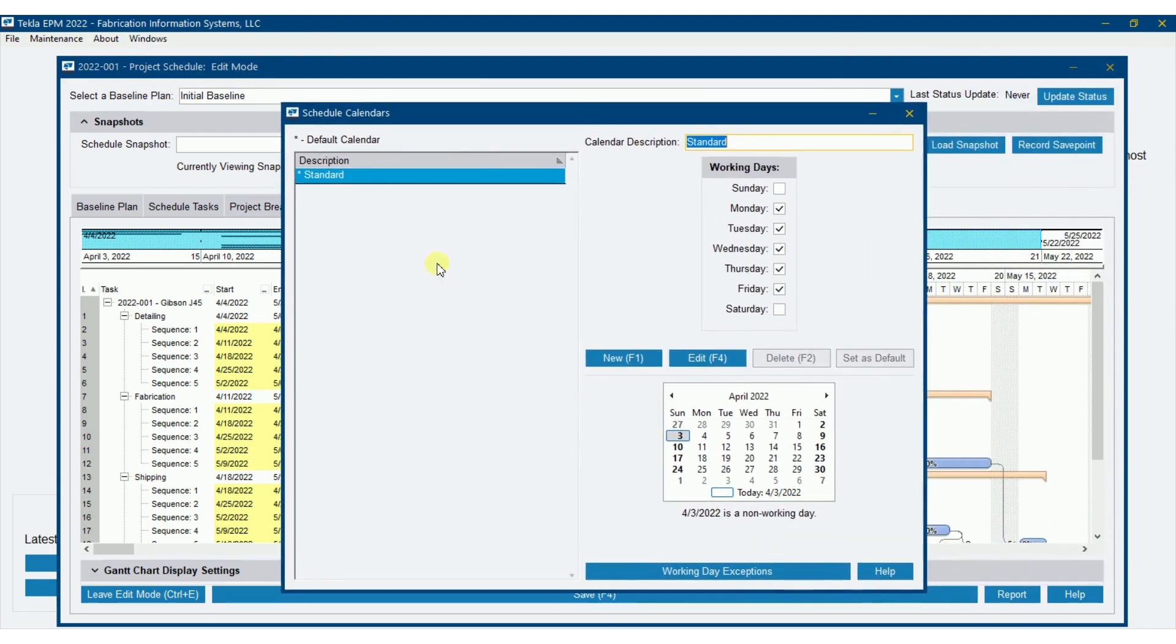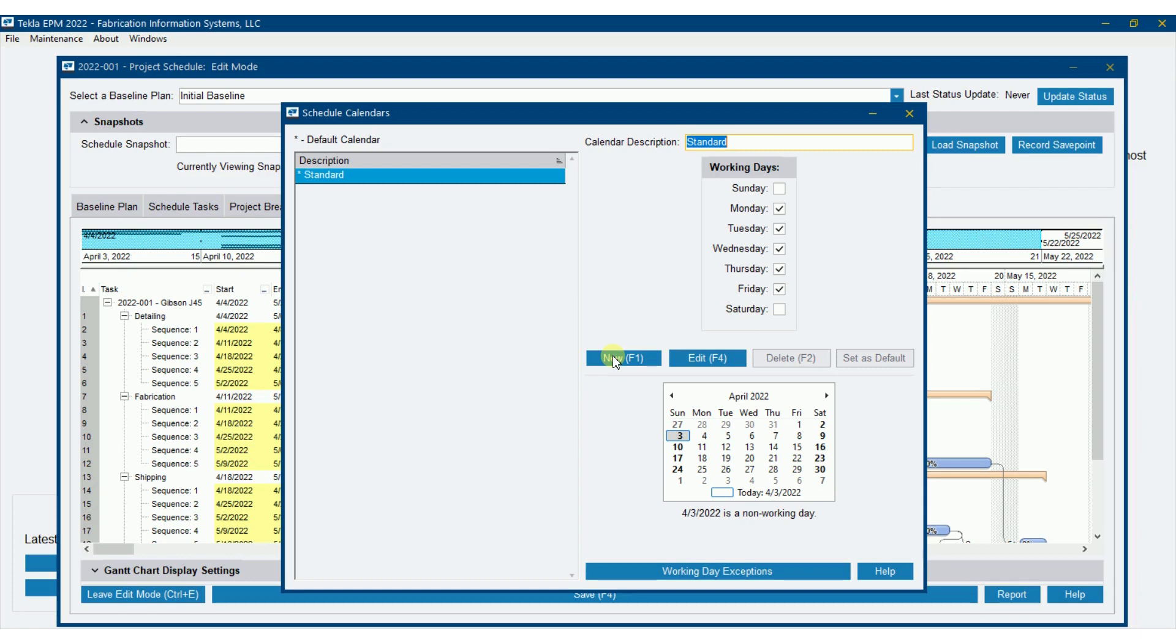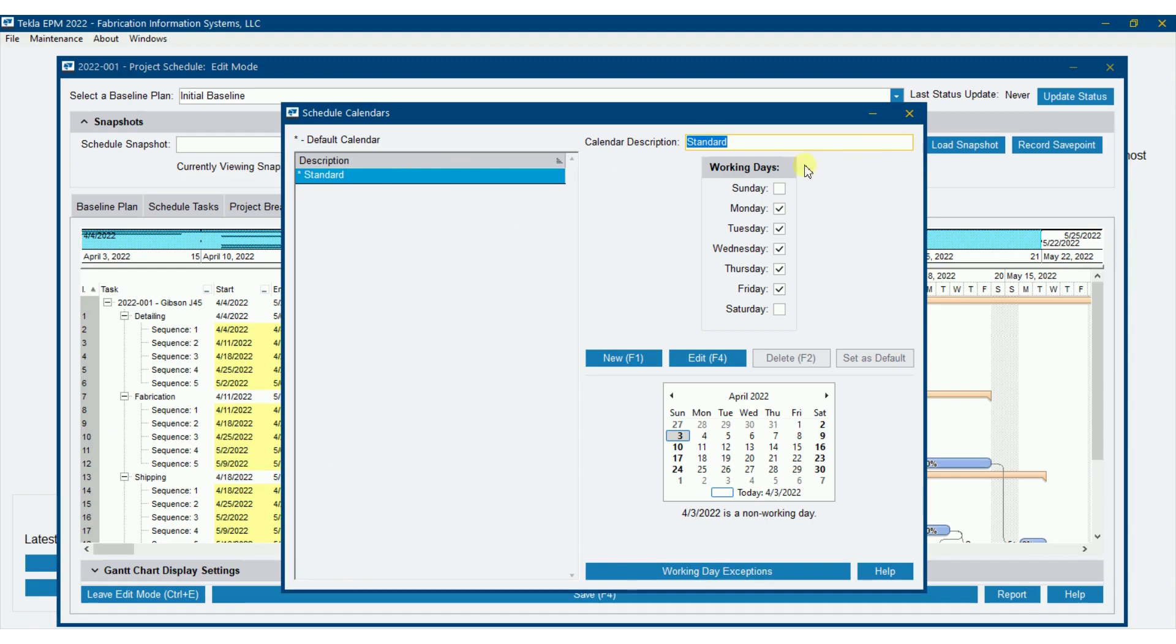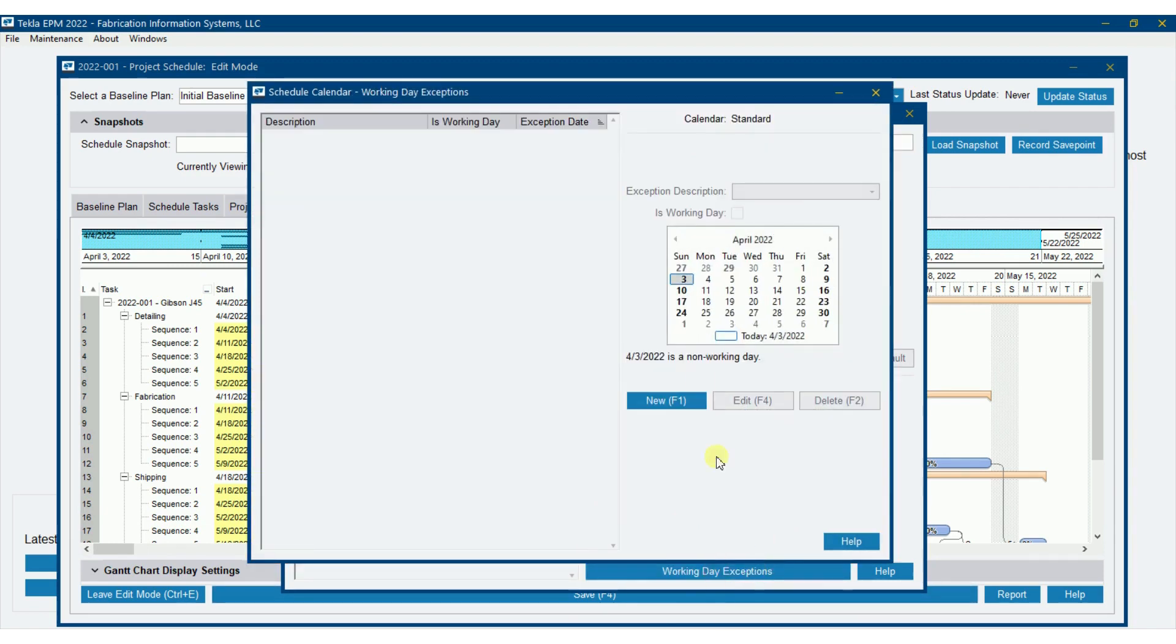So I've got calendar set up here. This is our standard calendar. I could add a new calendar as well. That would make sense in the case of a company that has multiple sites. You might have different calendars that you go by at various sites. Or if one site is working on a Saturday and another site is not, you can use that to your advantage and set up separate calendars. I'm going to deal with the one calendar here. And here's where I'm saying based off of this calendar, we're working Monday, Tuesday, Wednesday, Thursday, Friday by default. But notice down here, I can add in working day exceptions as well.